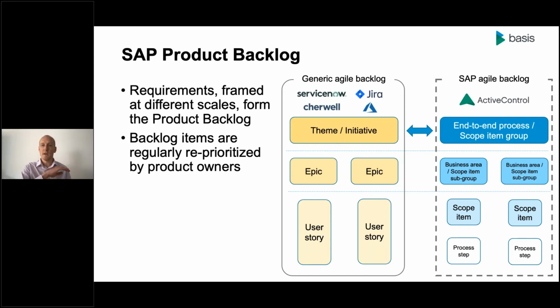But of course, we're going to have overarching goals. Many of those individual user stories will ladder up to bigger outcomes, and that's where these ideas you may see of epics or themes and initiatives come in. So different layers of hierarchy, and we might be delivering a certain number of user stories in a sprint, and then we aim to deliver an epic over a certain number of sprints, for example.